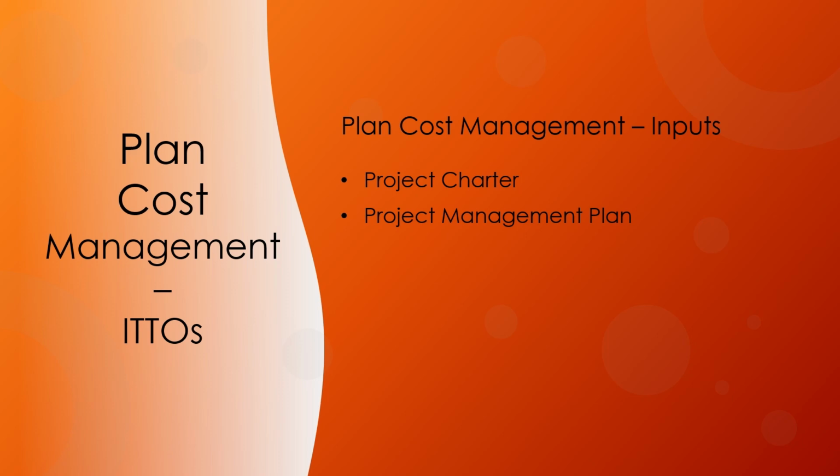The two components of project management plan that are required for cost planning are schedule management plan and risk management plan. The schedule management plan specifies the standards and procedures for making, maintaining, and managing the schedule. Cost estimation and management will be impacted by the processes and controls in the schedule management plan. The methodology for detecting, analyzing, and monitoring risks is provided by the risk management plan. Processes and controls that will affect cost estimates and management are provided by the risk management plan.